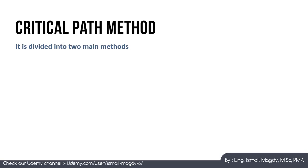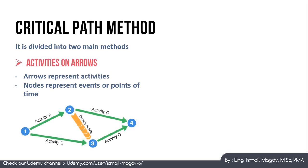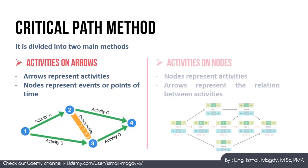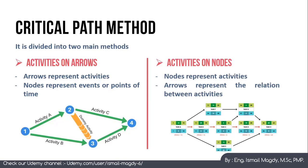The second method we will learn today is the Critical Path Method, which is divided into two main types. The first is Activities on Arrows, where arrows represent activities and nodes represent events or specific points in time. The second is Activities on Nodes, where nodes represent activities and arrows show the relations between them — this is the more commonly used method.